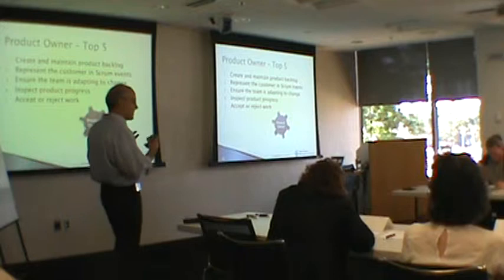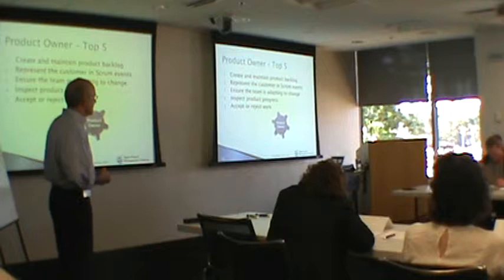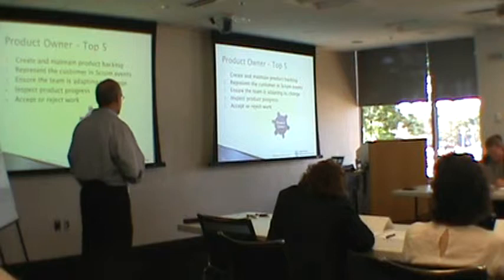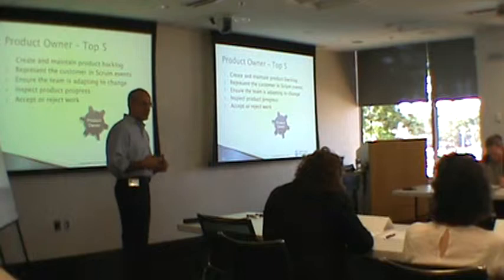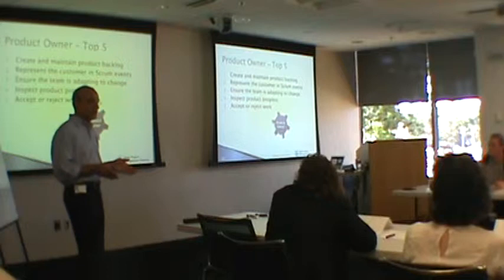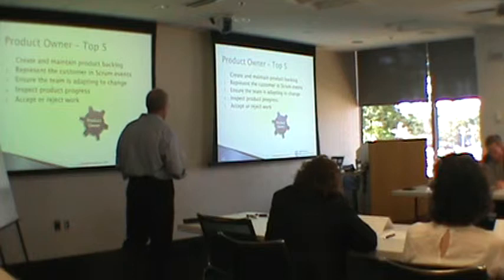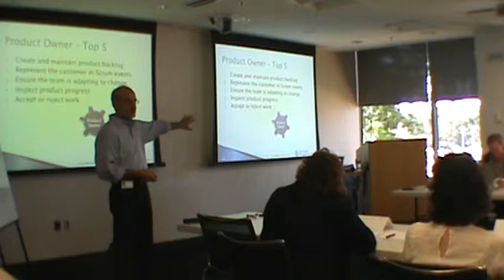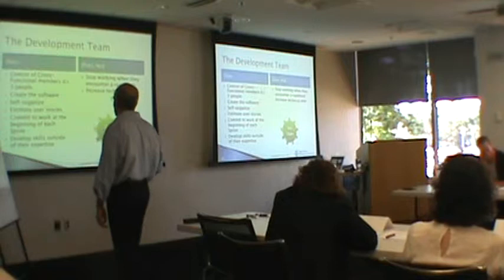The Product Owner's top five things: you need to create and maintain the product backlog; represent the customer in scrum events — all those sprint or iteration meetings; show the teams how to adapt to change, because you're responsible for introducing change and you need them to understand you could change direction completely each iteration; inspect product progress; and ultimately accept or reject work. Any problems with these core five? This is the meat of it.